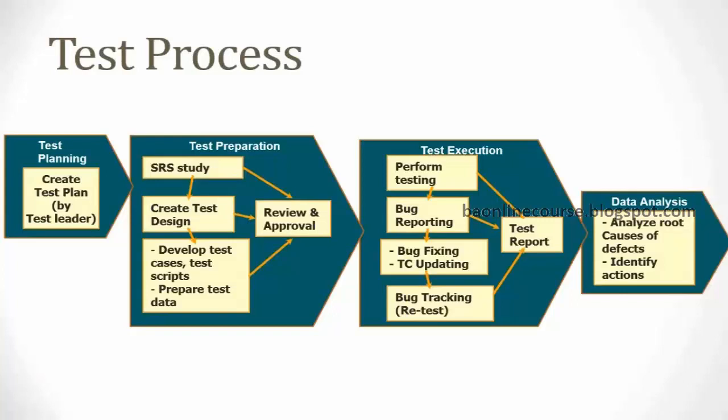Okay, then you'd actually start executing them on a daily basis. Let's say on a daily basis you're executing some 50 test cases. So your overall UAT could be for 2 weeks, right? It'll take 2 weeks to complete all those 500 test cases, so 10 working days, which is 2 weeks. You will complete that as part of the test execution.